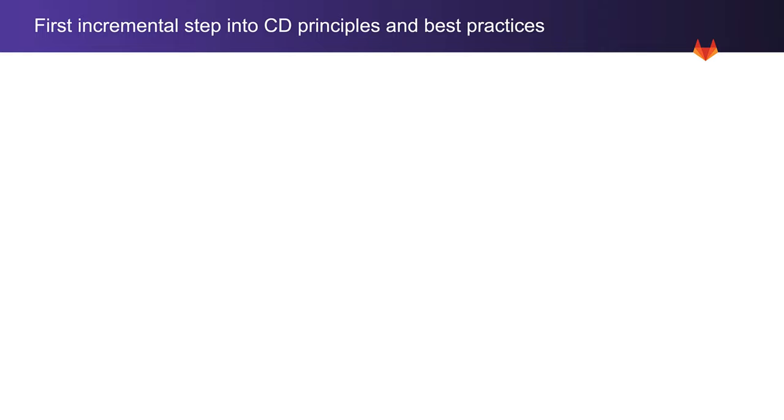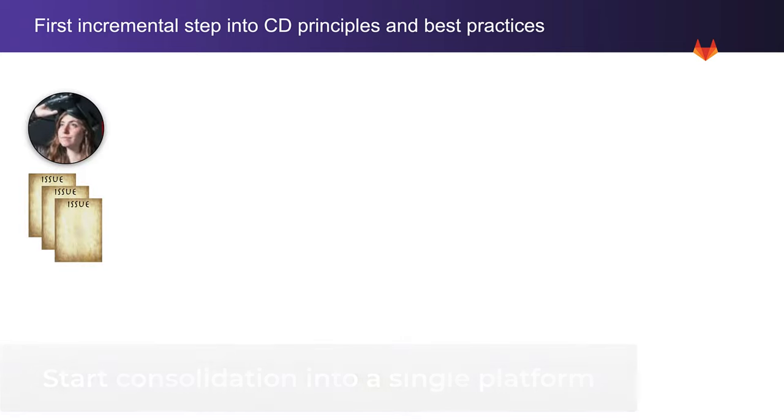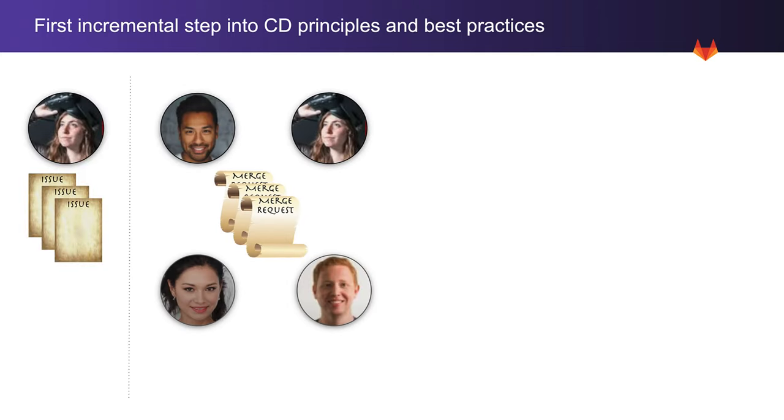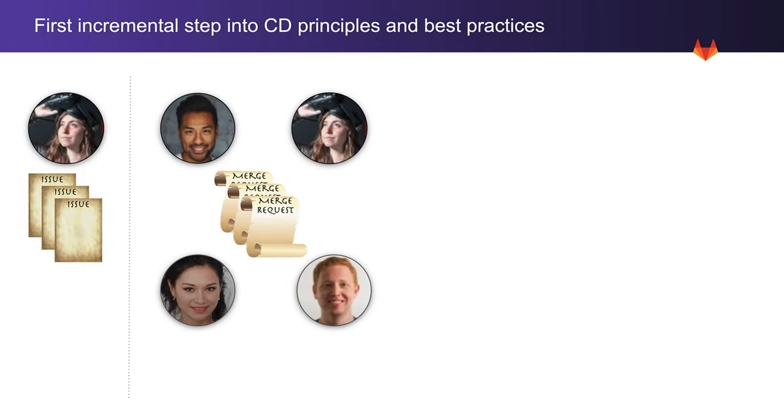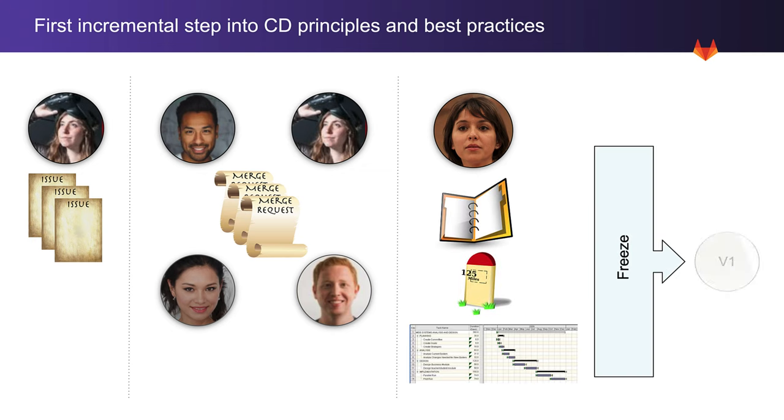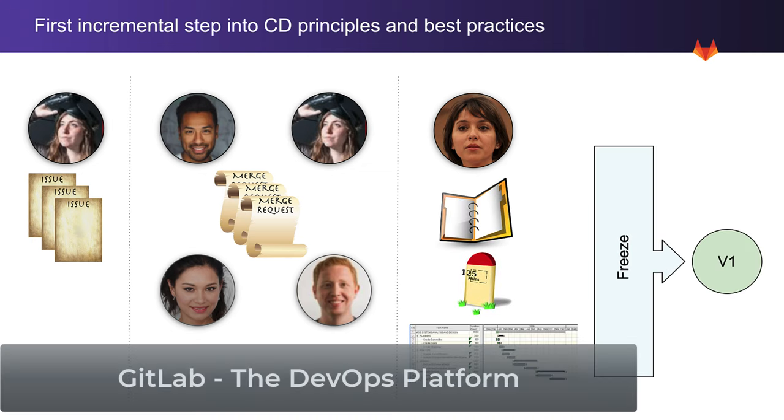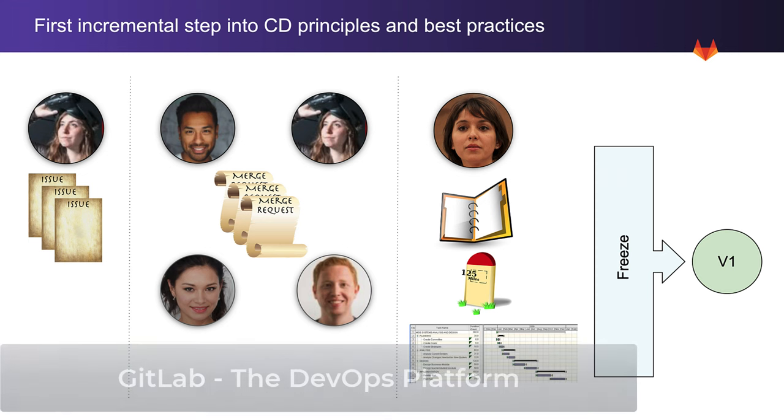As part of a first incremental step into adopting continuous delivery principles and best practices, developers work on issues, stakeholders collaborate on merge requests, and at a predetermined point in time, Rachel declares a freeze and cuts the release. All these activities are supported and take place in a single DevOps platform, GitLab.